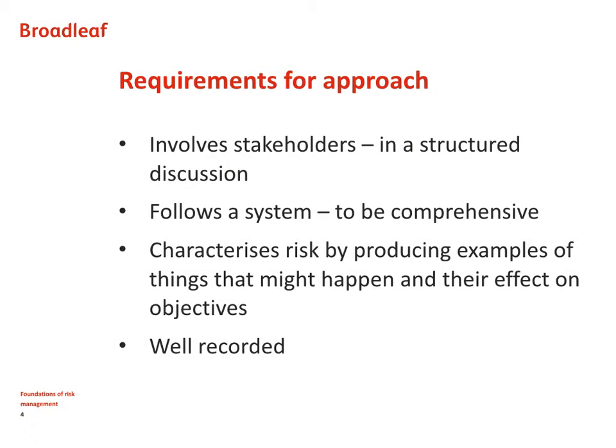There are many different methodologies for discovering risk. But whichever the approach we consider, they all have the same basic requirements. First of all, that they involve collectively a group of stakeholders in some form of structured discussion. Secondly, that there's some system behind the process that ensures that we are comprehensive and reliable and repeatable. Thirdly, that we characterize risk by these examples of things that happen and their effect on objectives.